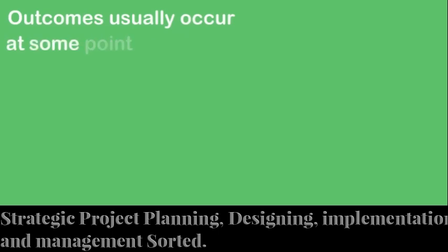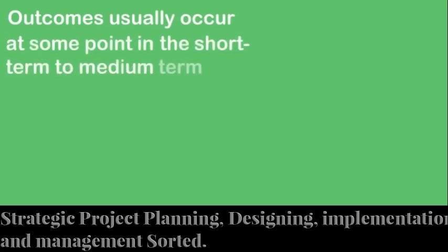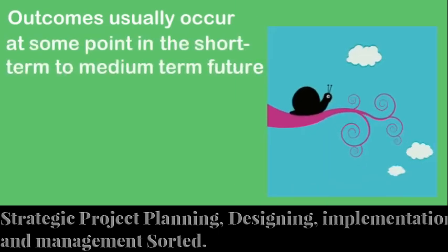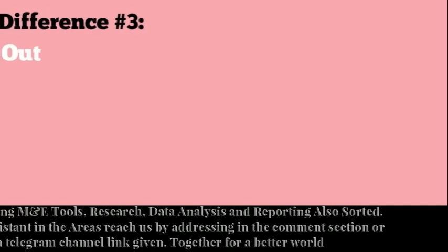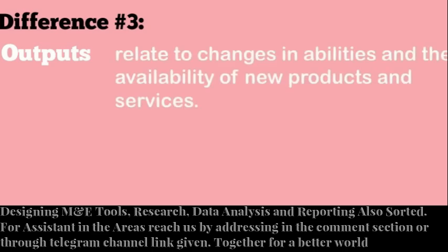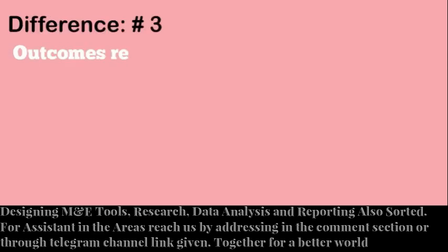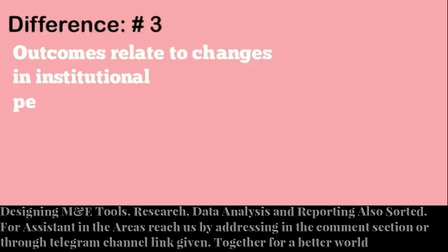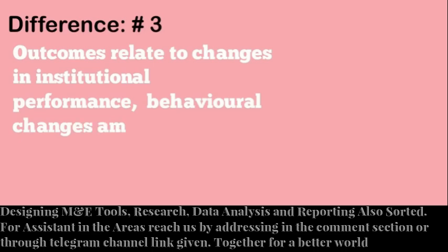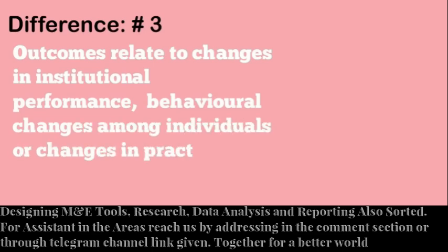The first way to identify outputs versus outcomes is to focus on the verb. What are you actually doing in your project? Are you building, creating, producing, or delivering something? If so, that's likely an output. On the other hand, if you're improving, increasing, reducing, or enhancing something, that's likely an outcome. For example, if your project is about building a new hospital, the hospital itself is an output. But if the goal is to reduce infant mortality rates, that's an outcome.